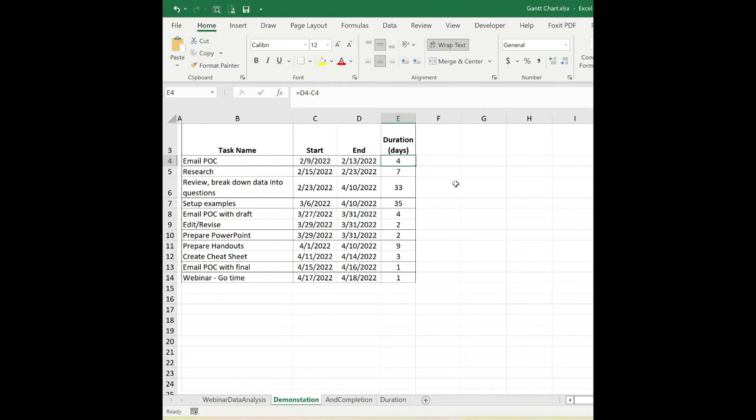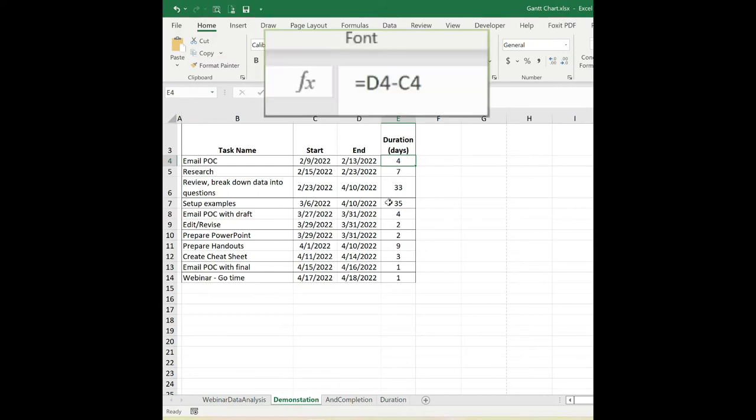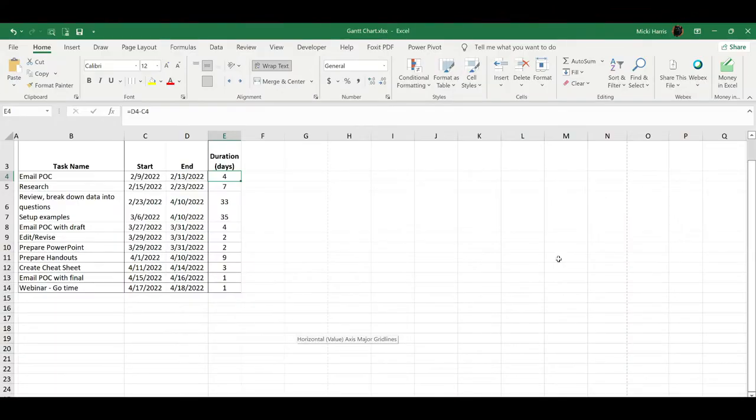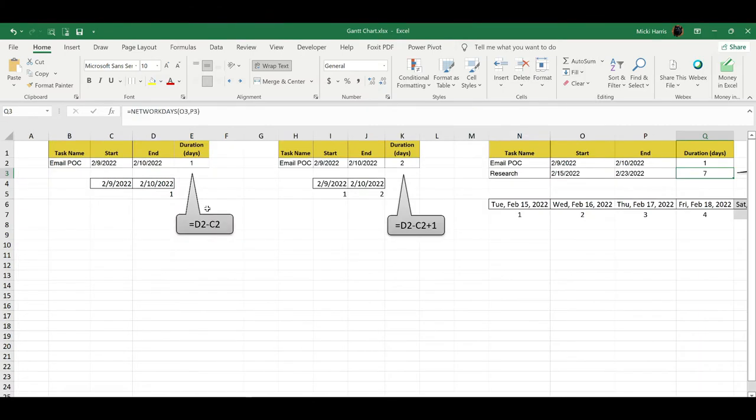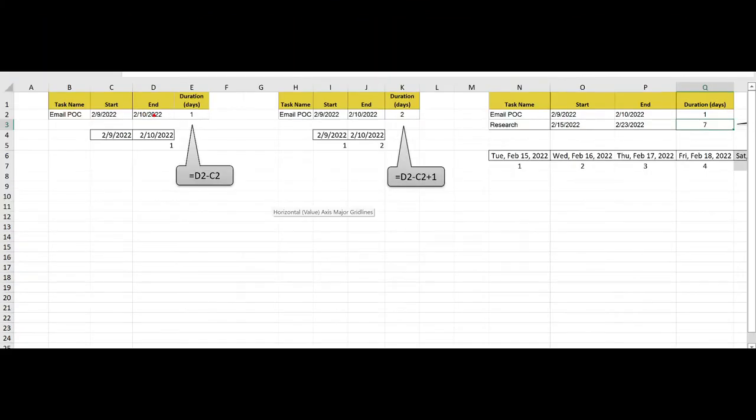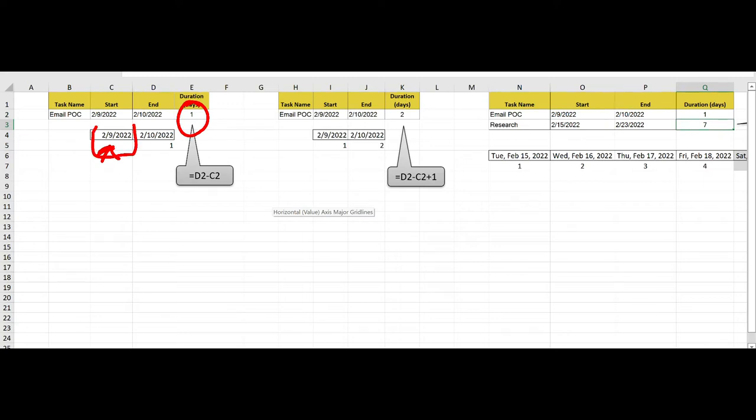So you can see here that I'm using a formula with my start date and my end date. There are three ways you can enter the formula for duration, and it really just depends on your scheduling needs. If I'm using a simple formula where I'm taking the end date minus the start date, it's going to return one day. So it's not counting this first start date right here.